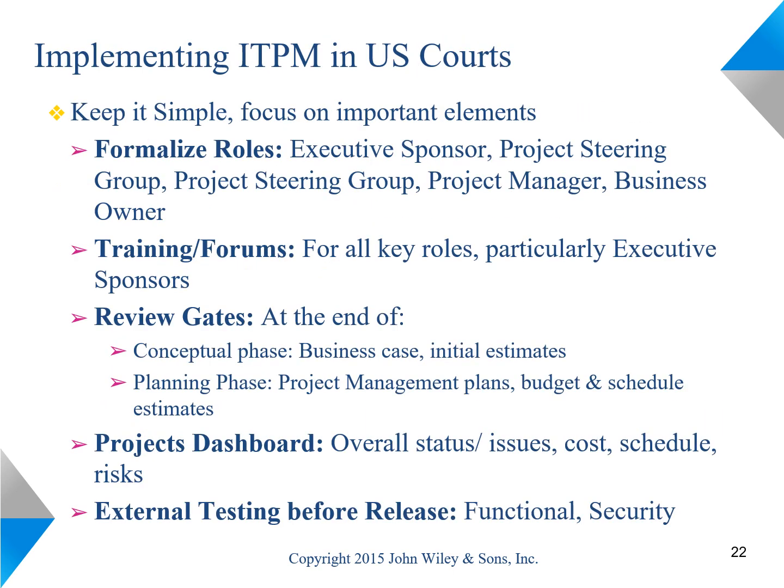When I was the CTO of US Courts, the project management office reported to me. We decided to implement a more rigorous approach for managing our IT projects. We wanted to keep the process as simple as possible, but we also wanted to include all the key elements of PMBOK and other methodologies. We formalized the key roles on projects: executive sponsor, project steering group, project manager, and business owner.